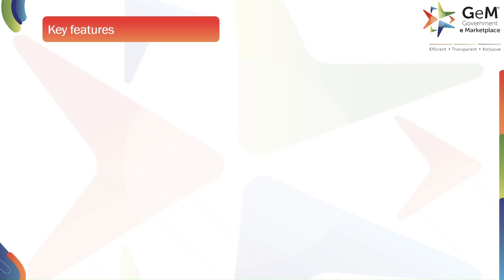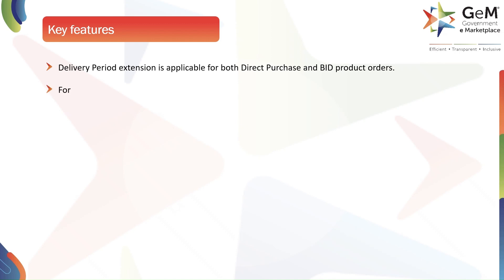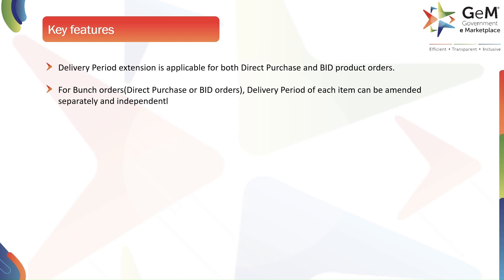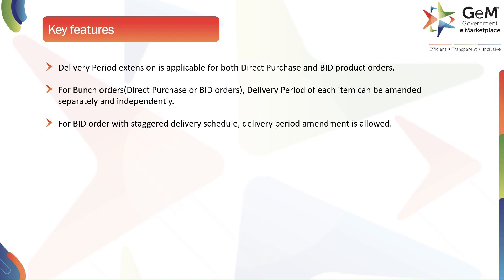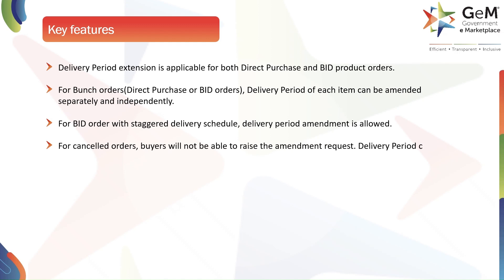Let's dive into the key features of delivery period extension. Delivery period extension is applicable for both direct purchase and bid product orders. For bunch orders — direct purchase or bid orders — the delivery period of each item can be amended separately and independently. For bid orders with staggered delivery schedule, delivery period amendment is allowed. For cancelled orders, buyers will not be able to raise the amendment request.